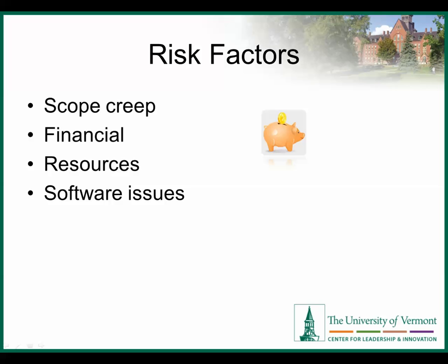Some of the risk factors associated with it could be scope creep, where initial resources have a budget, or for when you want to make more enhancements to the system than originally designed. This happens a lot. So you go in to do just a basic flow sheet redesign, and then the end user thinks, well, if we're going to redesign the flow sheet, then we need to redesign our order sets to make sure that whatever is done in the order set gets fulfilled by the nurse. So it's more than what was originally designed.